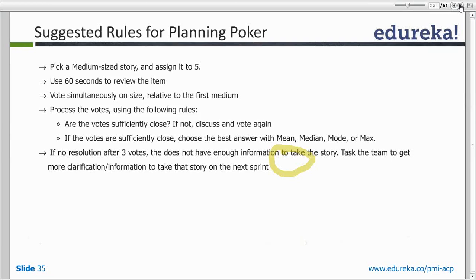The only catch is that even after three sets of voting, if the estimates come in like 3, 5, and 8, a mean or average value is taken and the estimate is considered as 5. You don't go beyond three sets of voting.